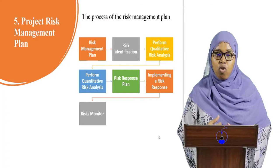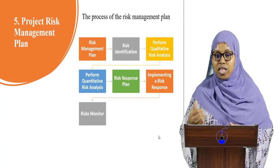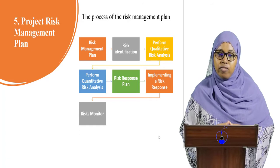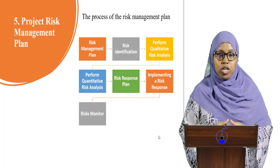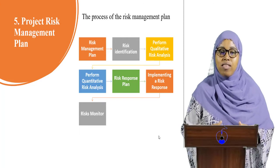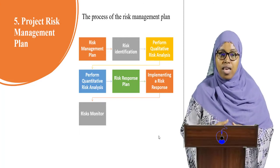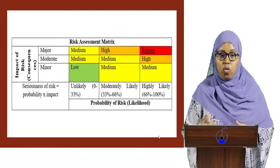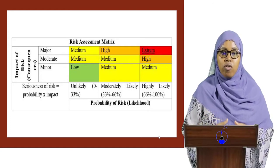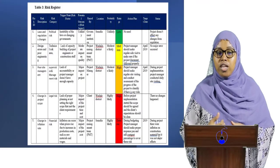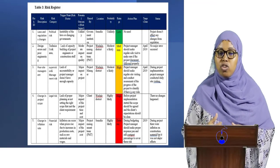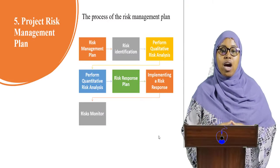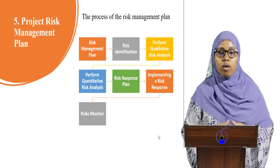Project risk management is an ongoing process that continues throughout the life cycle of the project. This includes making a complete risk management plan by identifying available risks from previous projects or risk assumptions. You can then analyze them using qualitative and quantitative analysis, and the project manager can make a risk assessment — evaluating the impact and probability of identified risks by collecting all necessary information into the risk register. The StarZone project manager uses this risk register to document all identified risks, then implements the risk plan with regular monitoring and control.